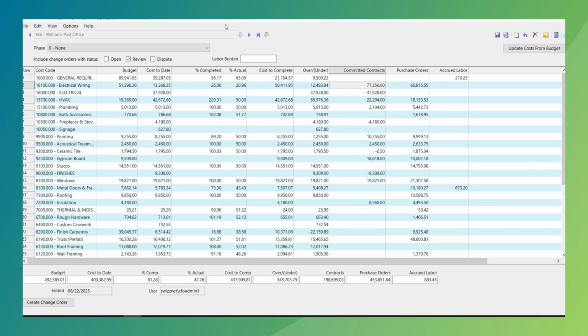Some of them do it on a monthly basis, some do it on a weekly basis. But it's not so much how often you do it, it's important that you do it, because cost is always fluctuating within the project. Something is always happening. So we always want to compare exactly how much our cost is against our original budget, getting back to having our budget within the system.